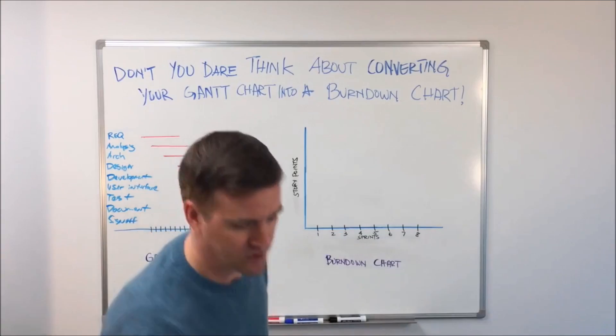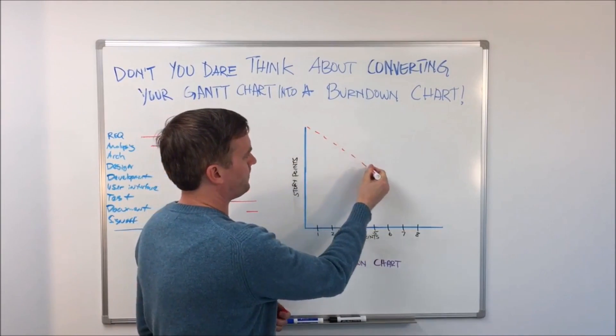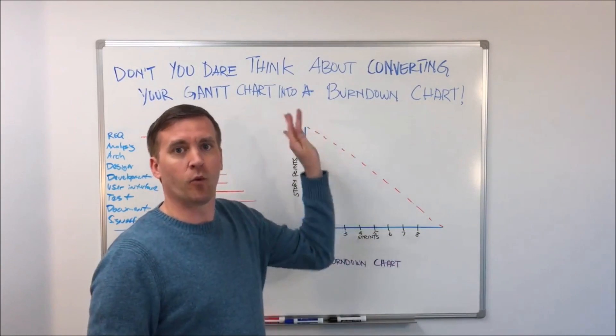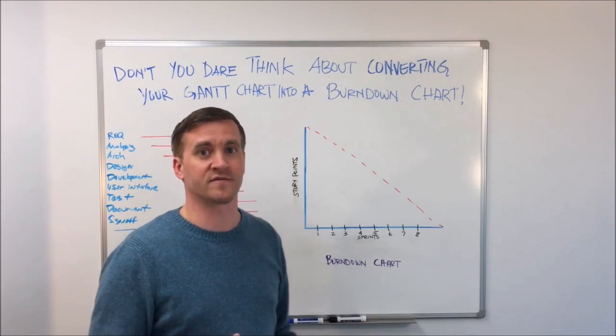Now over here we have a burndown chart. The way burndown charts work is over a certain amount of sprints, we have a certain amount of work that we would like to have finished. Typically that amount of work is measured in units of story points.